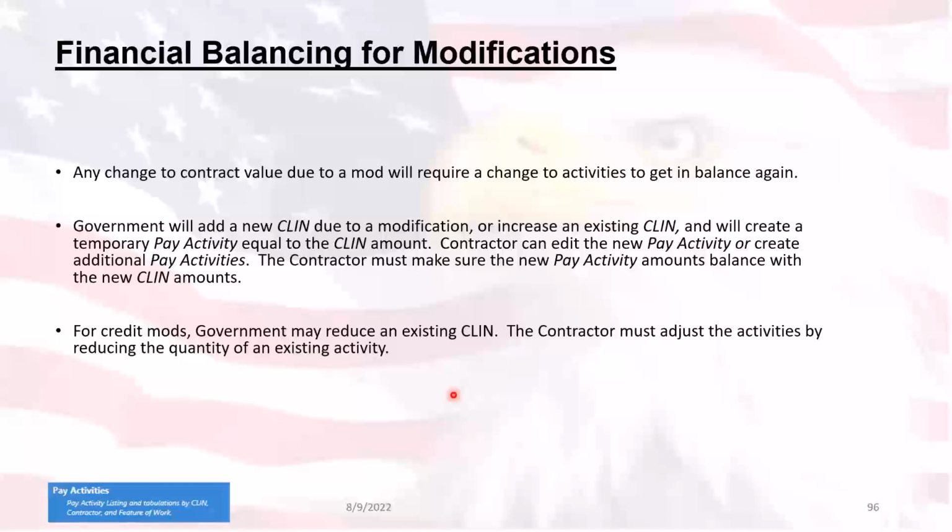You'll be able to edit that information for them. However, if they're using an SDF file and they neglect to enter that new activity ID that you've balanced for them so nicely, and then they go to do their SDF import, it's not going to match. You're going to have negative numbers on the progress payments, and they're going to be like, huh? Why do I have a negative number here?